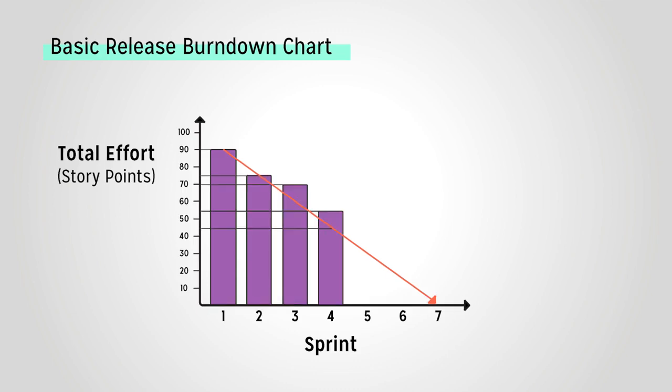You can also use the prediction line to see if you are on track with development. Let's say we have just completed sprint 4. In the first sprint we completed 15 story points, and we wanted to maintain that pace — that is the prediction line. However, in sprint 2 we only completed 5 story points, so our bar for sprint 3 is now above the prediction line. In sprint 3, we completed 15 story points and got our velocity back, but we're still behind schedule because of sprint 2.